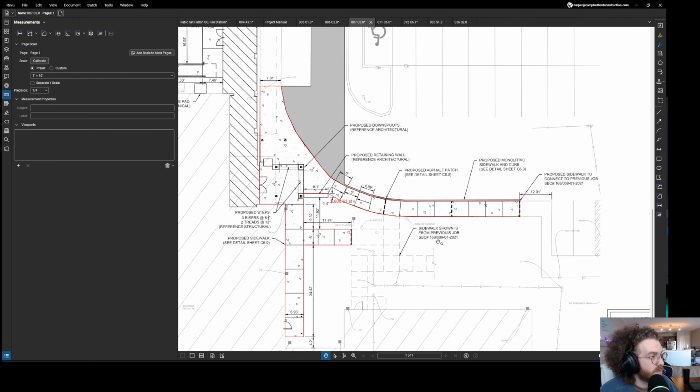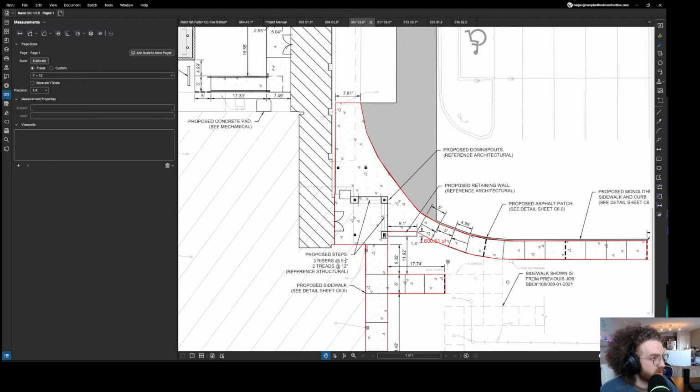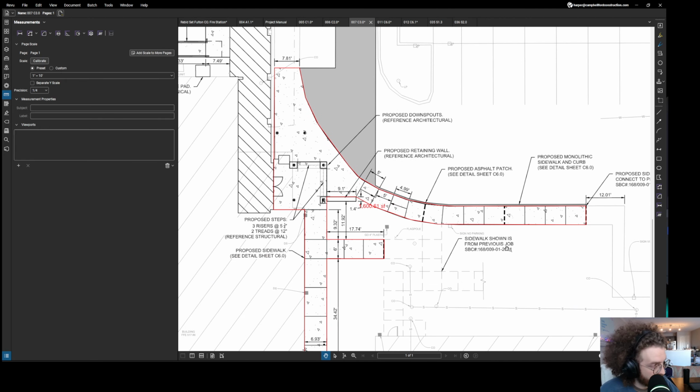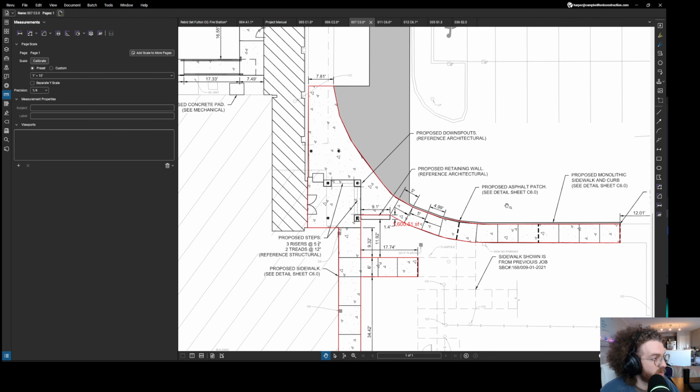So with my job, just to show you how easy it is, I take that number, and because I know that this sidewalk is 4 inches thick, which it usually is for walking sidewalk, and I've looked at the other sheets of this plan beforehand, I know exactly how much per square foot my price is for labor and material to put in 4 inch thick sidewalk. So I would just take that square foot number, throw it in a proposal line item, and then apply my number to it.